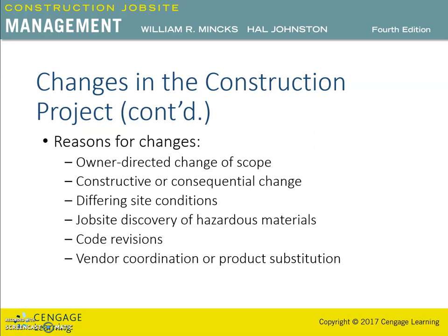Most of this equipment is noted as NIC, not in contract, or OFCI, owner furnished contractor installed. So additional installations such as mechanical piping might be necessary to facilitate the equipment installation.